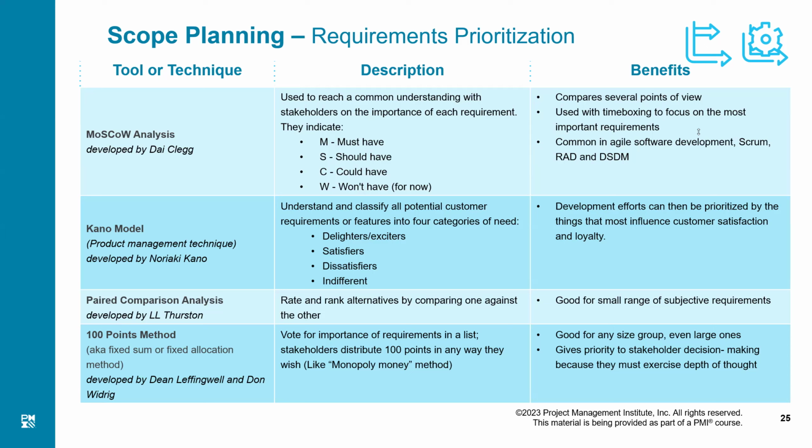So it has a very low priority, and in the beginning of the project, we decide that these are the won't haves. We will not ever create them, right? Pre-decided that this requirement is not to be met. Or it is won't have, at least for now we think that. Later we may change our point of view, and that is how it is done.